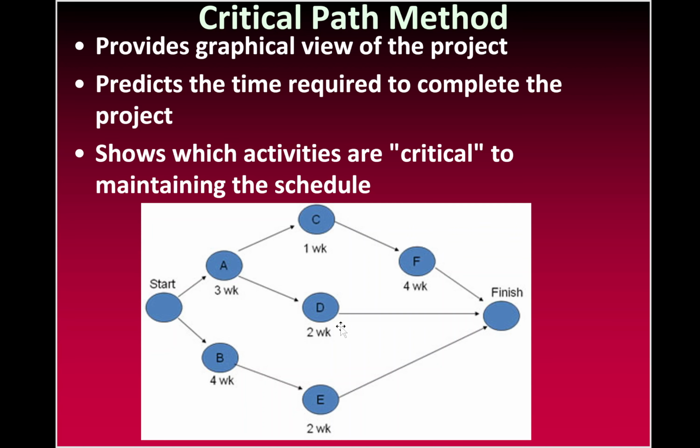And basically, you set that critical path and you plan around that because, again, that's the fastest you can do things, right? How long is it going to take to get the foundation? How long for framing? How long for the roof and skinning, right? Then how long for the plumbing and electrical? Then how long for the drywall, right? All of that stuff has an order, can't be done until the previous one. There may be other tasks that you can fill in around that can be done in parallel, but finding that critical path will define the quickest time to get to the end of the project that you're working on.